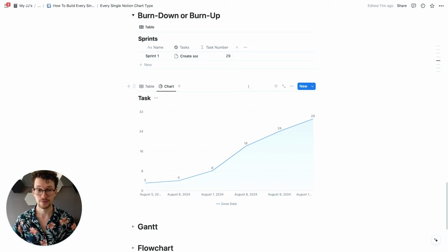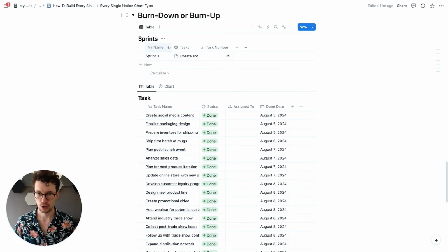Some of the tasks couldn't be finished, and we don't want to really compare it. So instead of having the absolute numbers, ideally, we have here the percent value of everything, so that we see, okay, are we reaching 100% or not? And for that, we need to further modify our data. So the best way to do this is to first go on sprints and add a calculation here, figure out how much every individual task contributes to the total sprint. And it's fairly straightforward to do.